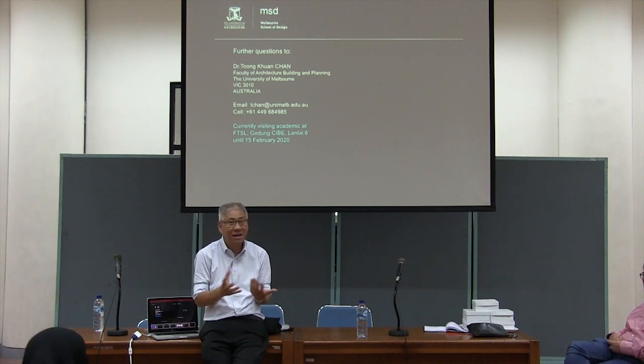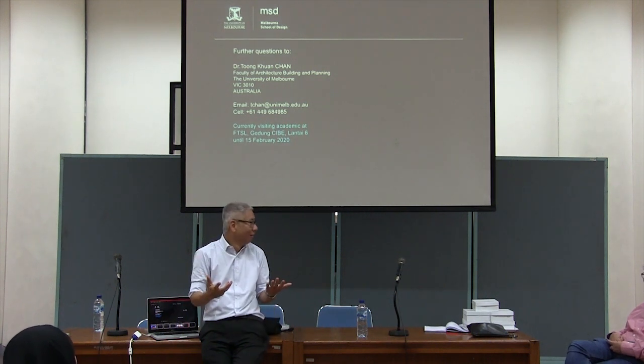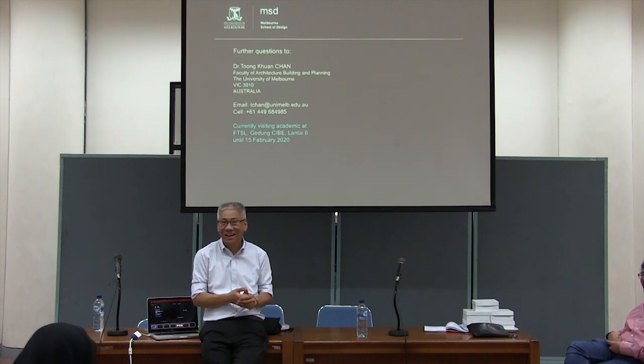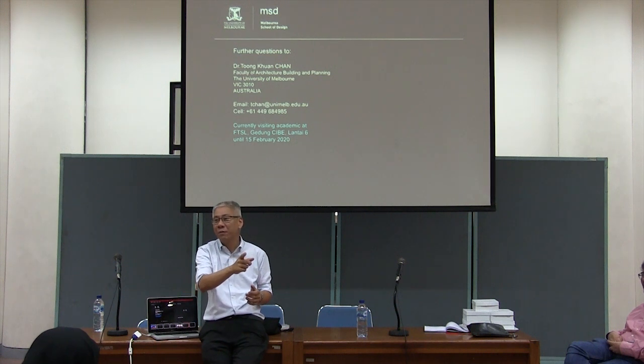So expensive here. I never realized it was so expensive here. Because for our students, anything, crane. Get a crane for tomorrow. Okay? And I'm sure over here, if you call up, you want a crane for tomorrow, your boss will say, hey, wait. Do you really need a crane? Crane is a long lead item. Oh, long lead item. Okay, ours is called tomorrow, the crane comes.